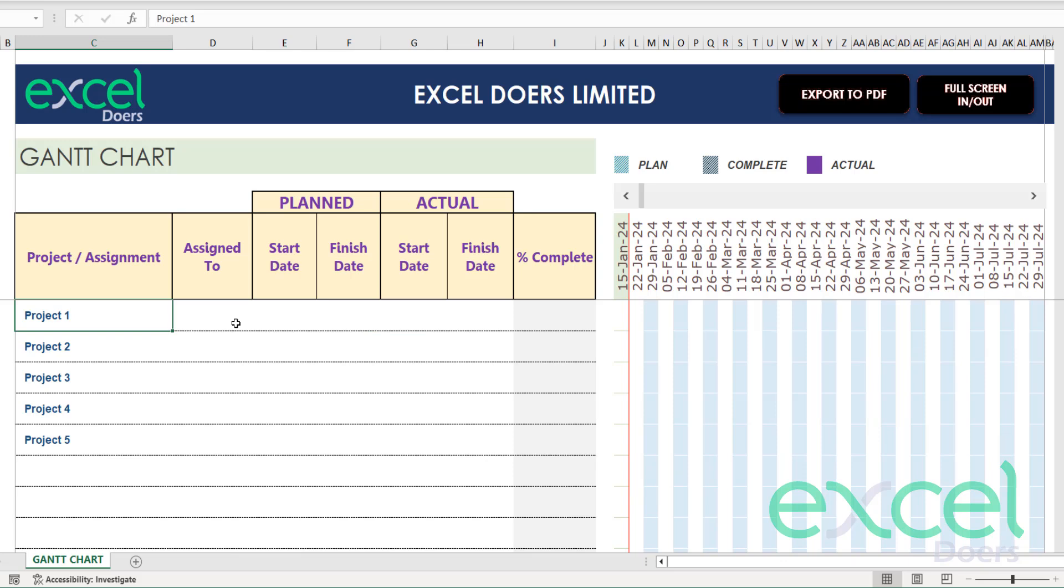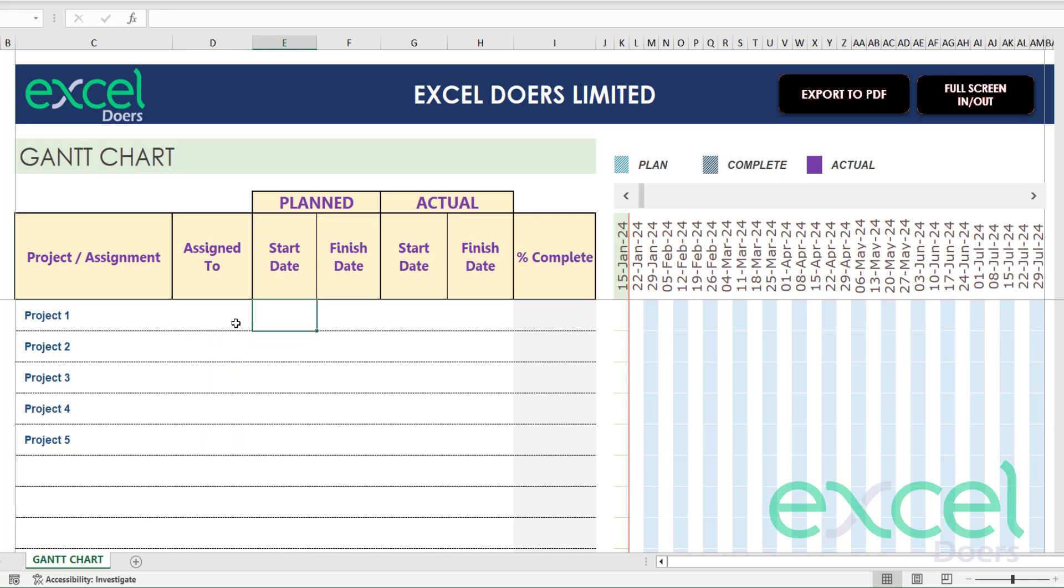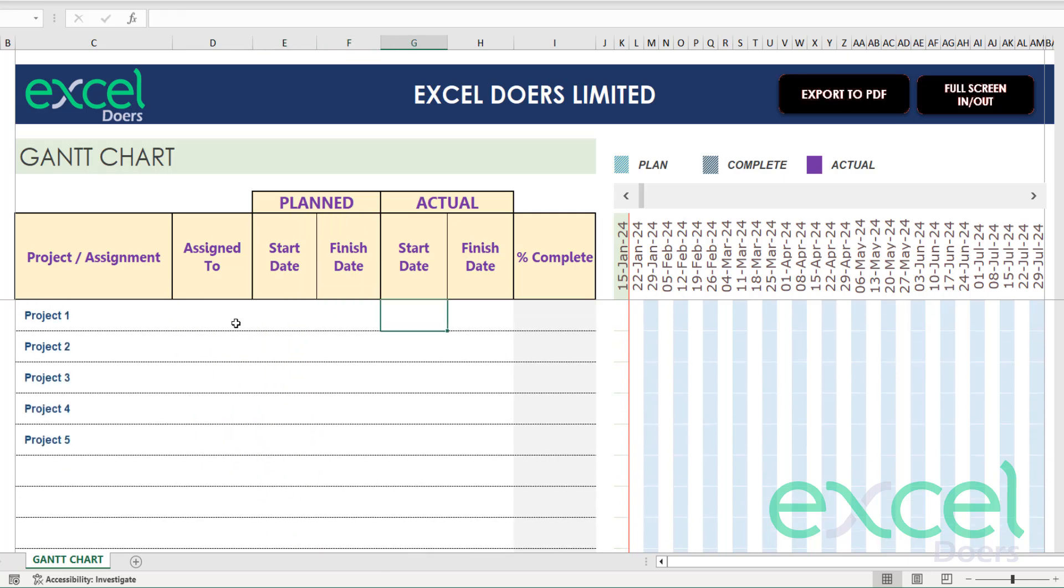Here you can list down all your projects, who are responsible for them, when you're planning to start and finish, and when it actually starts and finishes. Then I have entered a formula to calculate the completion percentage. You can also enter it manually yourself, but it will calculate itself.